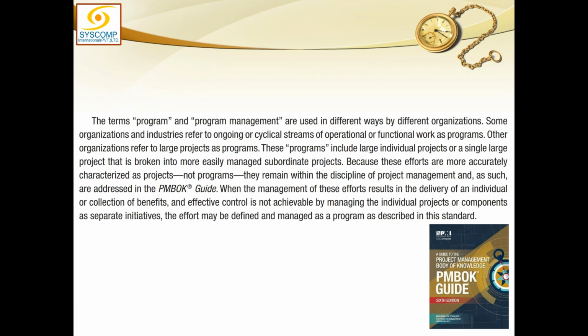Program realizes benefits, not deliverables. So whatever deliverables are produced within a program are then processed into benefits, and ultimately when the benefits are realized, they come out as a result of the program. So this is the clear distinction between a project and a program. If you are constructing a house, the house is a deliverable, so that is a project. Okay, how can we confuse it?